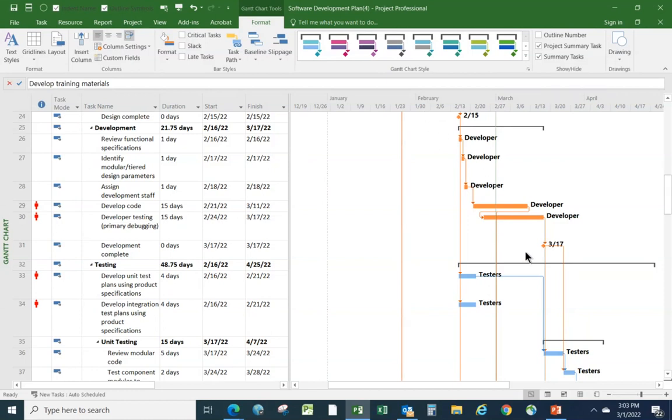So if you like, these are upstream critical tasks. These are tasks which are critical with respect to what is leading to the start date of task 52. So what I'm going to do is undo both of those. Drop down task path and uncheck both predecessors and driving predecessors.